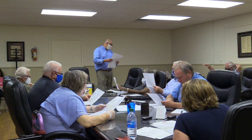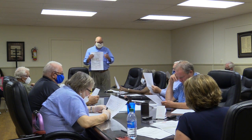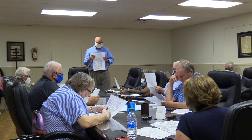Aaron, you might clarify that those allowances are included in the construction budget. Correct. I mean, in the 11 million. Correct. So you see all those allowances add up to $546,000. That $546,000 is within the CNI bid price. So the $11,098,000 bid price that's in the contract right now includes those numbers. So these aren't additional to the project. They're just allowances in the bid. It's basically $546,000 in CNI's contract that we just go shopping, basically.